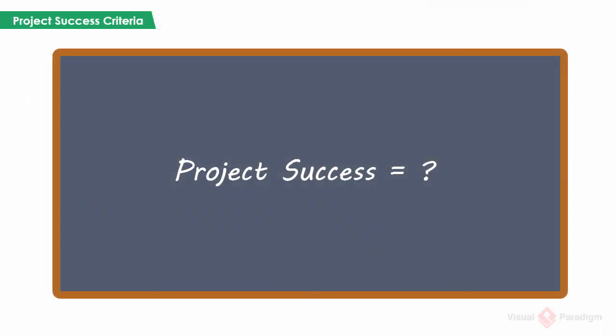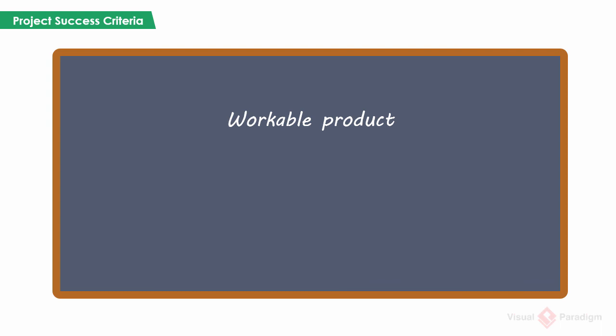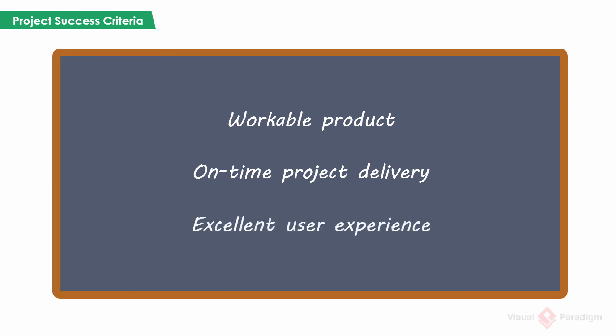Project success criteria are the principles or standards used to determine or judge project success. While it seems obvious that to deliver what the customer wants on time and within budget will be considered success, in practice there are usually way more criteria in determining project success. One customer may be willing to sacrifice features for a quicker availability of solution. Another may see the completeness and stability as the key criteria, and is willing to extend the project period to achieve this. The customers in both cases get what they want. Both are considered a success.